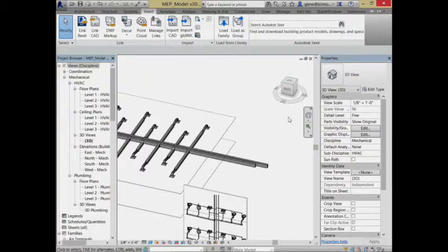You would think architects would want to do that coordination, but they rarely are the ones who do it. It's almost always the constructor. There's always going to be someone who's coordinating, and since ultimately the general contractor typically has responsibility for building it, often they take the lead in this. It's really odd. You think the designers would want to take the lead, but they often don't. It often goes to the general contractor.